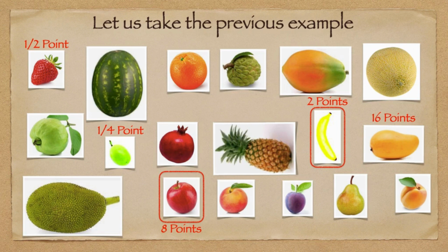Now considering mango's complexity, uncertainty, volume of work involved with our first reference, which is banana, obviously the developers realize it is definitely bigger. When they realize the mango is bigger than the first reference banana, then they go to the second reference apple. Obviously mango is bigger than apple considering the complexity, uncertainty and volume of work. Then they discuss how many times roughly. 1.5 to 2 times. So that is why 1.5 to 2 times 16 points, because 2 times of apple is 16 points, right?